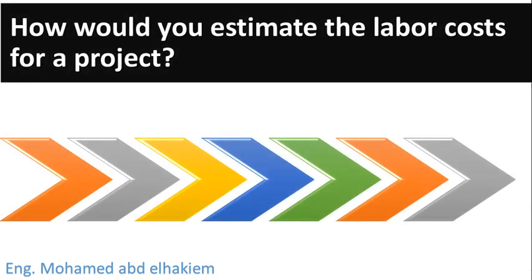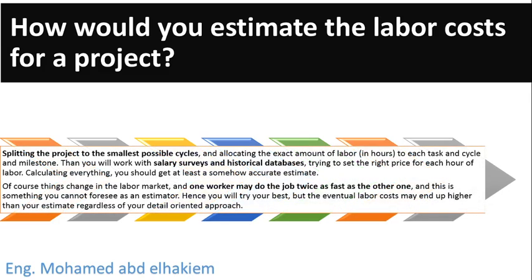How would you estimate the labor costs for a project? Splitting the project into the smallest possible cycles and allocating the exact amount of labor in hours to each task, cycle, and milestone. Then you work with salary surveys and historical databases, trying to set the right price for each hour of labor. Of course, things change in the labor market, and one worker may do the job twice as fast as another — this is something you cannot foresee as an estimator. Hence you will try your best, but the eventual labor costs may end up higher than your estimate regardless of your detail-oriented approach.